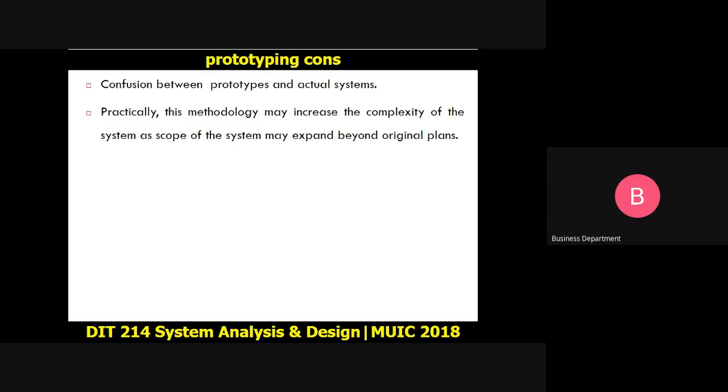Remember, before you even start creating the system, you need to have a proper contract with the client. What do you want me to be able to create for you? What features are you looking at? But sometimes, through prototyping, you'll find some users sneaking in some requirements which maybe you never agreed upon during the first day when you were scoping the project. And this might even push the system beyond your original plans between you and the user, sorry.